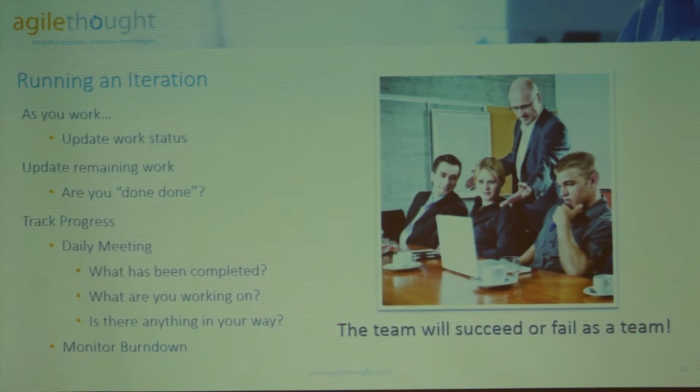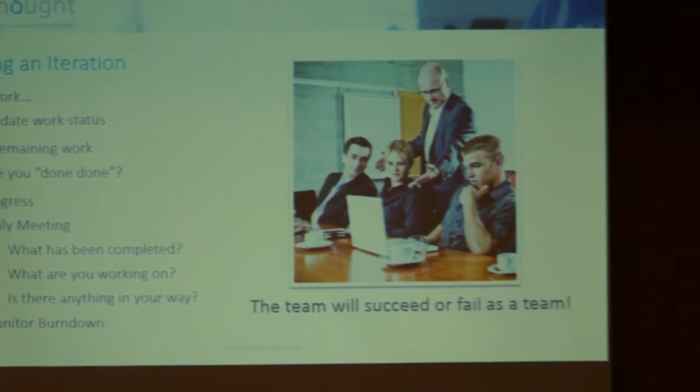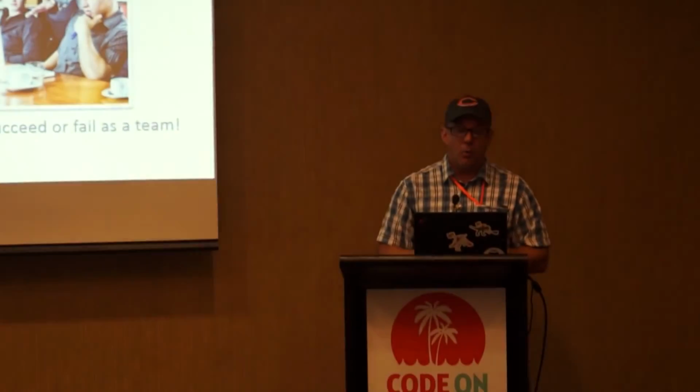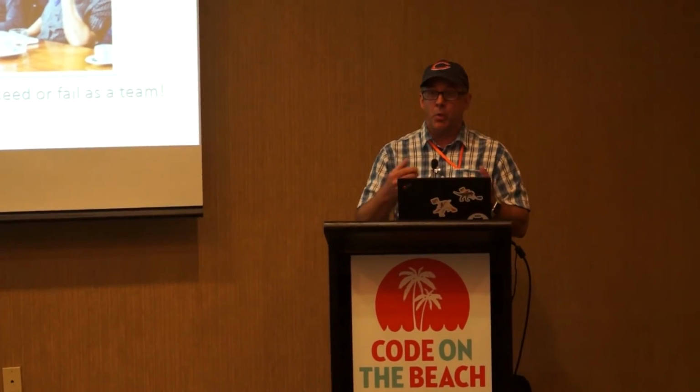The reason being is what definition of done does is it stops you from having work that you don't know is complete or not. So you don't know, should I continue to work on something or not? One of the killers of an iteration is not knowing what I'm supposed to be working on, or is it finished yet? So there are really two things. The one is the definition of done, the other one is unplanned work.